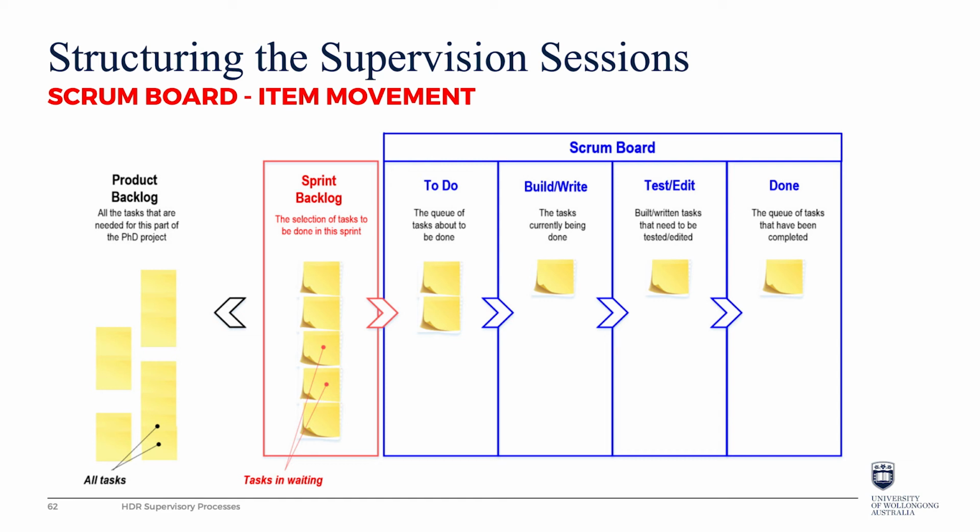We try not to move things to the left, always flow to the right. That way we progress. If we have to backtrack, that means that we have had a problem in estimating the difficulty of a task. Reconsidering that backlog, that thesis backlog, reconsidering that particular task improves subsequent sprints, but we try not to have delays caused by throwing tasks back into the thesis backlog.